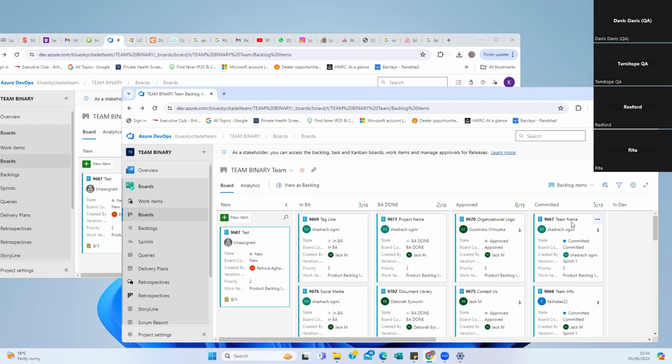And then this is also when we demo it to the client. We've done this part, the client gets involved, looks at what we've done. If there are any changes that need to be made, this is when they will be implemented, rather than waiting till the end and coming back to implement all those changes, updating or modifying the requirement. So that's just the difference. Trust me, you would rather work in Agile than waterfall, because Agile is more iterative. It's more interesting, to be honest, in my own opinion anyway.